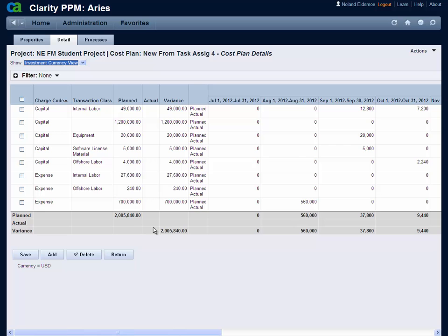The next step then would be to go back to your project schedule, change assignments, change ETCs on the assignments, update the schedule, which could be in the logic or when materials will be delivered and paid for, and then make the changes there, and then come back to the cost plan and do the cost plan over and get a new one and see how close that is, as opposed to going in and just changing some of these values.